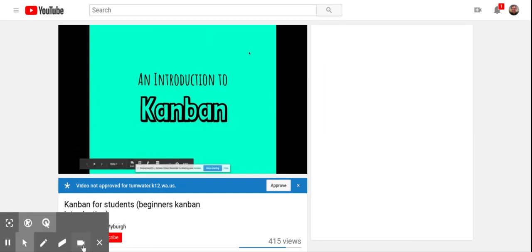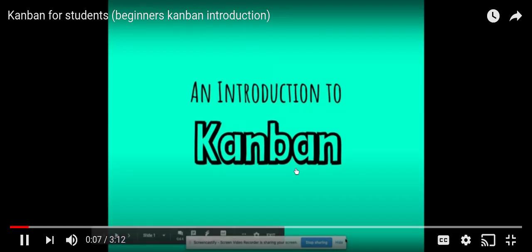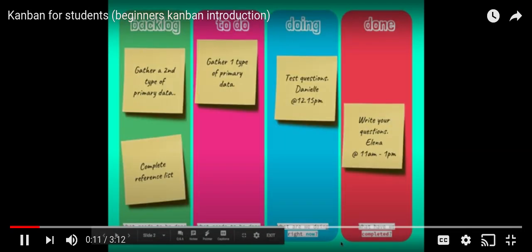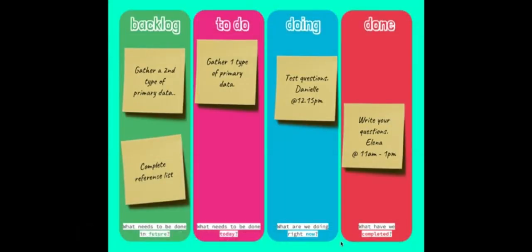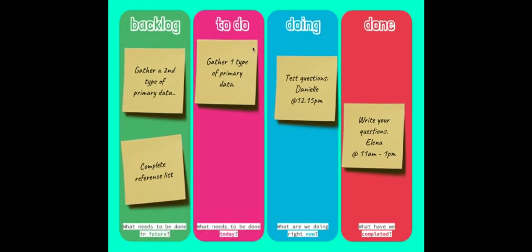This video is a quick introduction to a Kanban board. A Kanban board has 4 columns: backlog, to-do, doing, and done. In the backlog, there is a huge list of everything you've got to do. In the to-do column, there's only what you need to do today. Doing has a list of everything that you are busy doing right now.